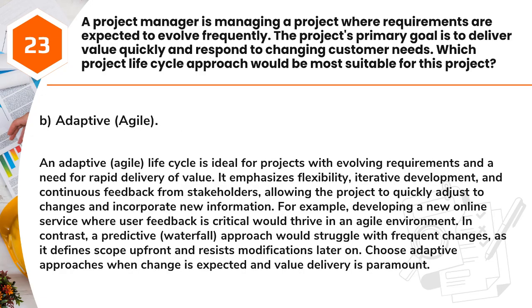Answer: B. Adaptive, agile. An adaptive, agile life cycle is ideal for projects with evolving requirements and a need for rapid delivery of value. It emphasizes flexibility, iterative development, and continuous feedback from stakeholders, allowing the project to quickly adjust to changes and incorporate new information.